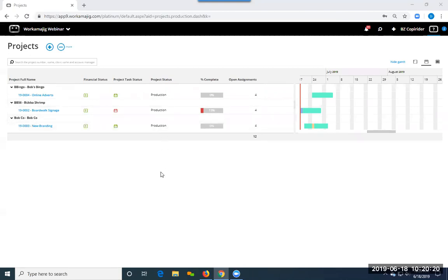How would you fix that? If something was due to be done 3 days ago and it wasn't completed, I would imagine that you would then need to adjust the rest of the schedule so you can pull it forward, right? So either automatically doing that, or you are looking at the do but not done list to see how you can readjust those schedules to get them back on plan.